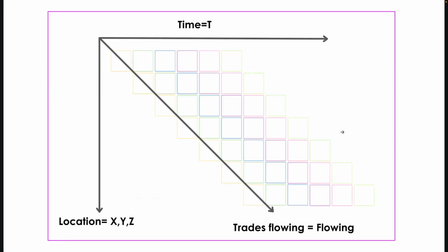So let's go ahead and make the distinction between this type of scheduling and other types of scheduling. First, time, like I said, is on the top and location is on the left. This is a superior form of scheduling for a number of reasons, but the format really gives it its effectiveness. If you were mapping out or scheduling a manufacturing scenario or a number of different scenarios, like for instance design in construction, you would still have time on the top and you may change location, but you'll either see the value adding unit or the value receiving unit shown on the left.